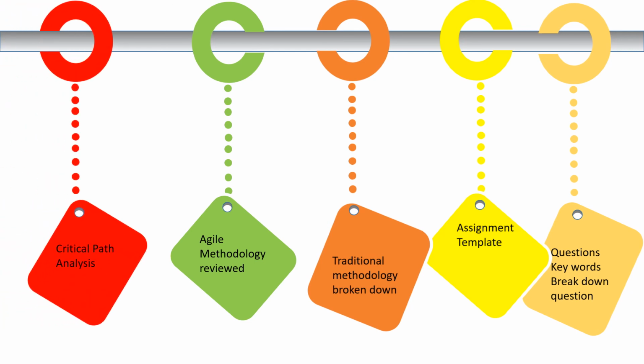And then finally, we looked at critical path. I explained to you nodes: on the left hand side of the node you have a number, and then on the top half, the time it normally takes to do it and the latest possible time at the bottom. The arrows represent the direction, and if it's an item A, then how many weeks or days or time period it will take is below that arrow. Moving forward, we worked through those, and then to get the least amount of time that it takes for the project to be on time, we worked backwards. We worked backwards to get the bottom figure on the right hand side.